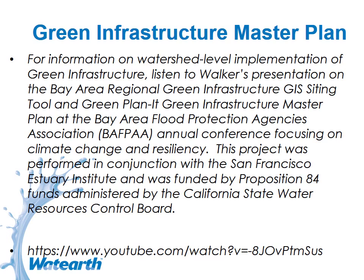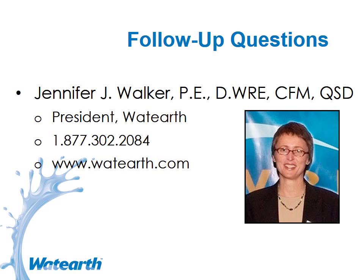And then on the construction phase, again, excellent. Chevron did a really good job, really good guys on the construction phase, but had a photo of the infiltration trenches come across my desk sooner, we would have been able to revise those. So as much as you can have somebody in the field that really knows what the facilities need to look like, that was very helpful.